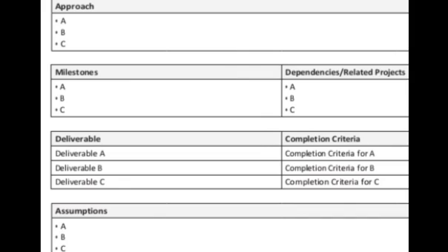Also, there are projects that are not dependent or related. You understand? Take for instance, in building that house, you are also going to build a fence for that house. You set your milestone A as the foundation for the house, then milestone B is the foundation for the fence. Milestone A, the foundation of the house, can be ongoing, and at the same time milestone B, the foundation for the fence, can still be ongoing.